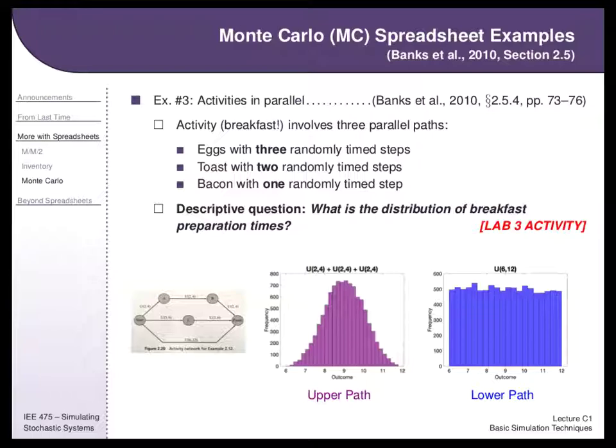And that is for the same reason that we just talked about. The idea here is that in order for you to get a 12, I need to draw a 4, a 4, and a 4. And it's fine, you can draw a 4 from a uniform distribution between 2 and 4, but to draw 3 of them independently is very unlikely. So although one uniform distribution can give you that maximum value, the sum of 3 of them is probably not going to give you that maximum value very often. So as you start adding things up together, you necessarily take distributions and you squish them down.